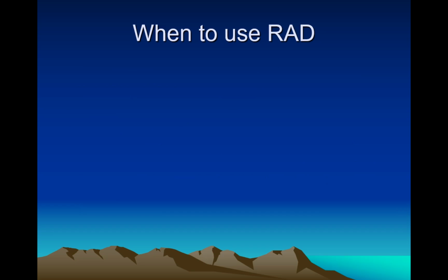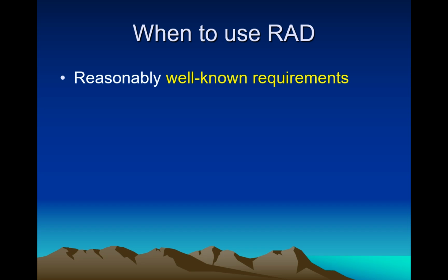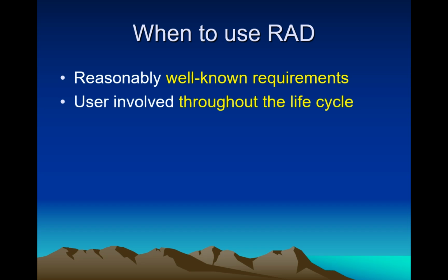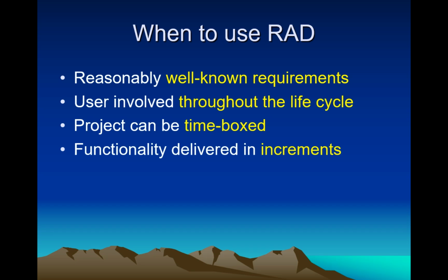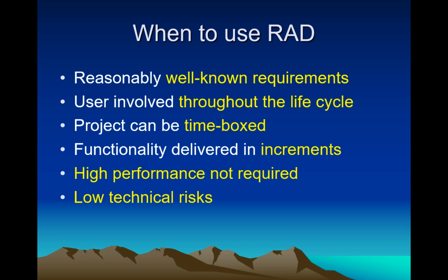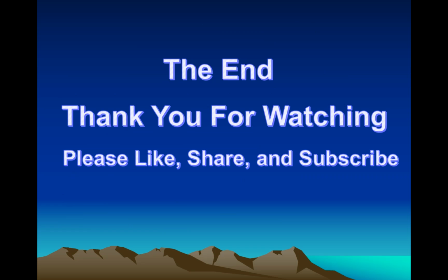When to use RAD or rapid application development. Reasonable, well-known requirements. User involved throughout the life cycle. Project can be time boxed. Functionality delivered in increments. High performance not required. Low technical risks. System can be modularized.